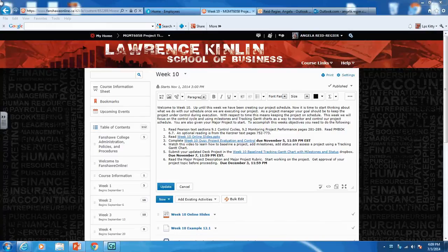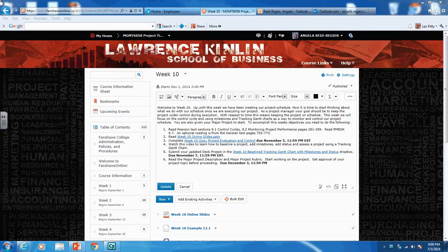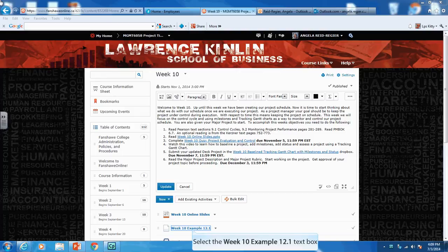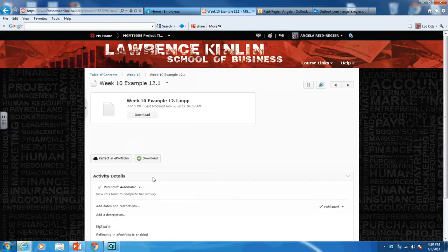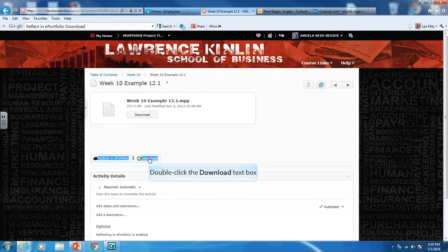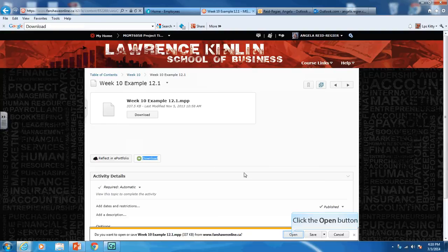Welcome to week 10. In week 10 we are starting to talk about what we do with a schedule once we start executing a project. In this demo I'm going to show you how to baseline your project — which is basically taking a picture of your project so we can compare our performance to what we planned to do — how to put in milestones, and how to enter status and show it in our tracking Gantt chart view. Open up the week 10 example 12.1 from Fanshawe Online, download it, and it will open up in MS Project.